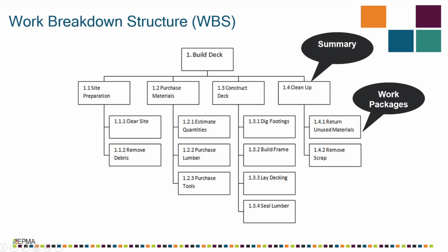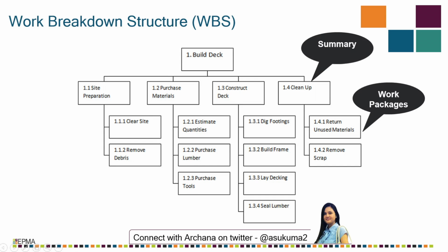As a project manager, the level of decomposition will be dependent on the extent to which you'll need to manage. For example, cleanup could be a work package to a specific project manager who is not bothered about the details. Another project manager who wants to assign different resources to different activities under cleanup would want to go into details, like return unused materials as a work package and remove scrap as another work package.